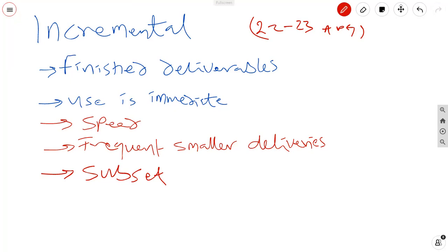The customer is able to see and approve of the style, color, and other details, allowing adjustments to be made before further investments of time and money are made. This reduces potential rework and or customer dissatisfaction.